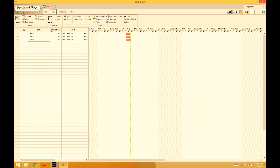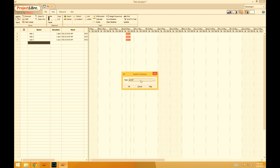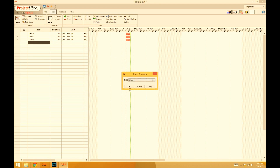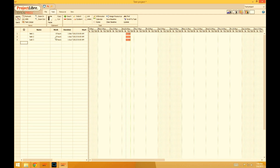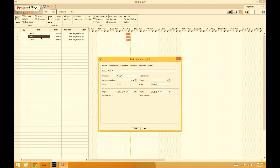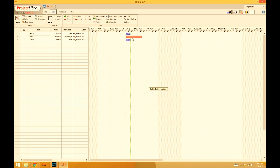We're now going to add tasks — simply click in the name field and start typing. I also wanted to add the work column, so right-click in the menu up here, select 'Insert Column,' and select 'Work.' Click OK and now I have my work column. I could also change individual tasks — double-click on any task, and here we have the details for the task. I might change the work time for this task to 15 hours. Notice it has also changed over here.